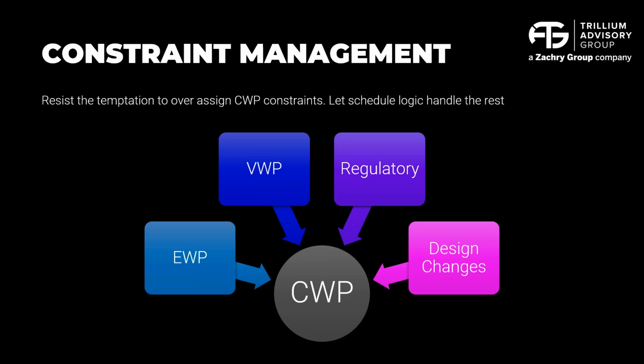The EWP: is the EWP projected to be ready according to schedule skyline dates? Or is it at least far enough in advance that the CWP start date can support proper IWP planning? Keep an eye on those EWPs using those skyline charts to get a good forecast of what's happening. Are you getting the right stuff? If not, start chasing them down, whether you're using your war room or some other methodology to highlight those EWPs that are impacting or could impact a CWP.